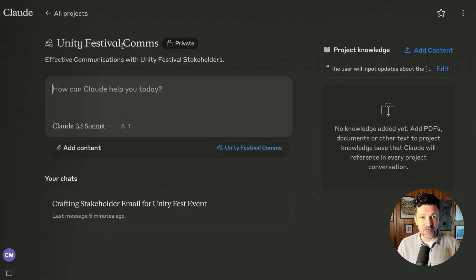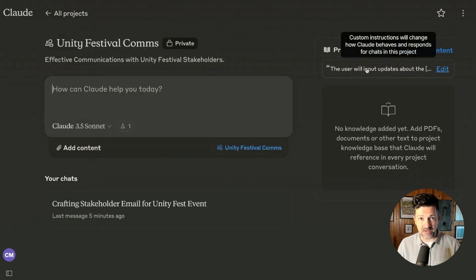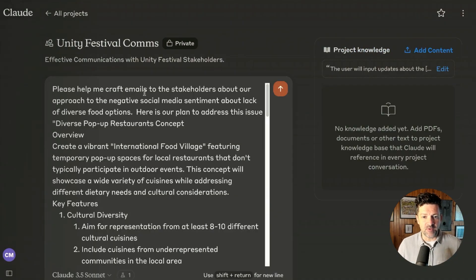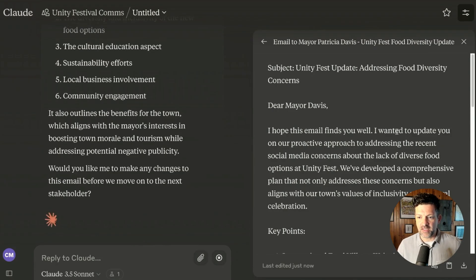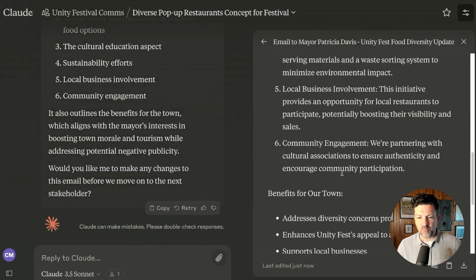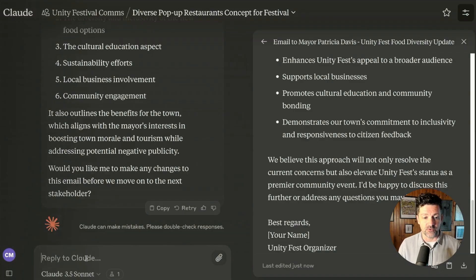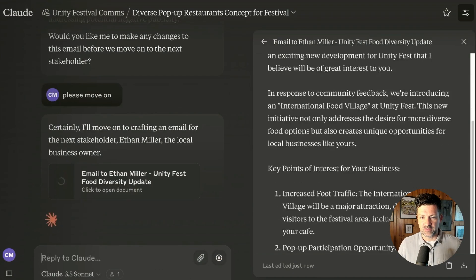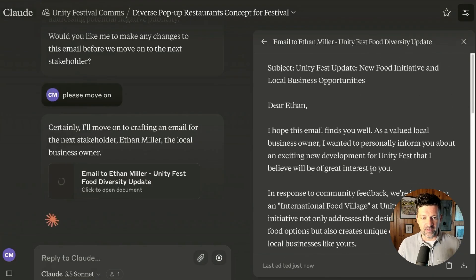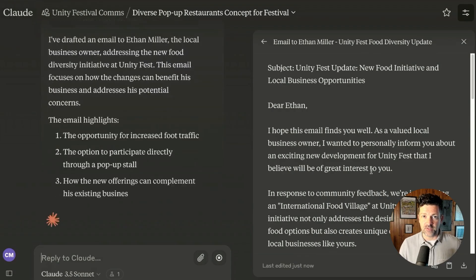I'm back in the Unity Festival Comms tool we built, which has our instructions with all the stakeholders. I say: please help me craft emails to the stakeholders about the negative social media sentiment regarding the lack of diverse food options — here's our plan to address this issue. Starting with the mayor, it gives an update about our proactive approach, with key points that really let her know we are on top of it. Then it moves on to the local business owner, and continues through all the different stakeholders — residents, volunteers, etc.